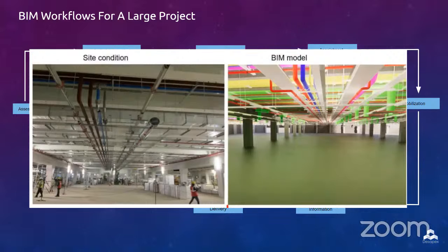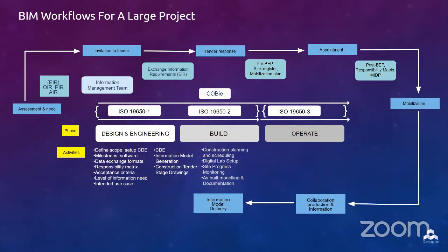Another great advantage of BIM and the as-built scanning is that you can compare the actual amount of materials consumed and the work status. Also, this data can be used for the vendor bill certifications and the purchase order approvals. Proactively, any potential risk that may occur can be documented using a risk register. The owner, contractors, and the engineers can collaboratively list the potential risks they foresee and plan risk responses to address these risks and reduce the impact of the risk when they actually occur.